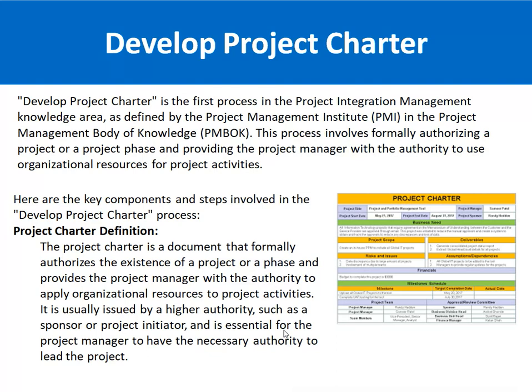Now, Develop Project Charter is a process which involves formally authorizing a project or a project phase and providing the project manager with the authority to use organizational resources for project activities. Just think of this as you are initiating a project. A company is initiating a project, and they develop a document so that everyone knows that this project is going to initiate, and this project manager is responsible to manage the resources and the budget as well.